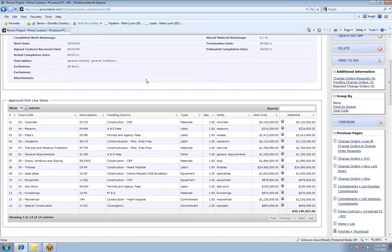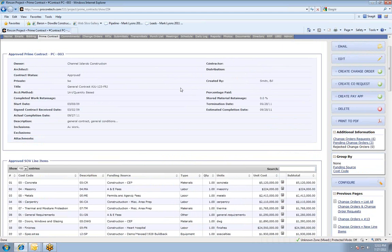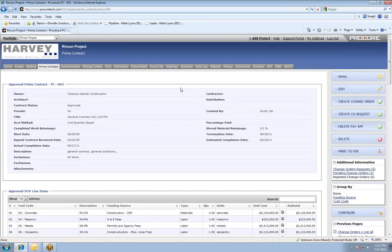Any questions on that process? The same thing goes for the subcontract side — if I wanted to create a subcontract change order, I would just go into that subcontract in Procore, hit the big button that says create a change order, and that would start the process where it gets emailed out to everybody.